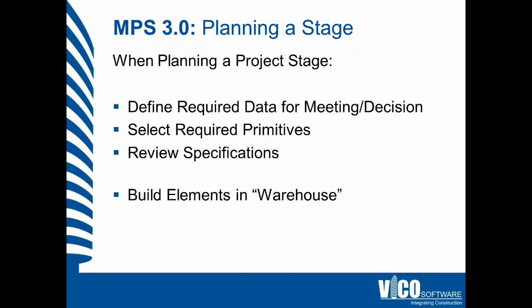With MPS 3.0, when you plan a stage, you first define the required data needed for the meeting or decision at the end of that stage. Then you select the required primitives and review the specifications you've put together in those primitives. Primitives become your standard — that is what you provide as a guidebook, a set of guidelines for development of your building information models.